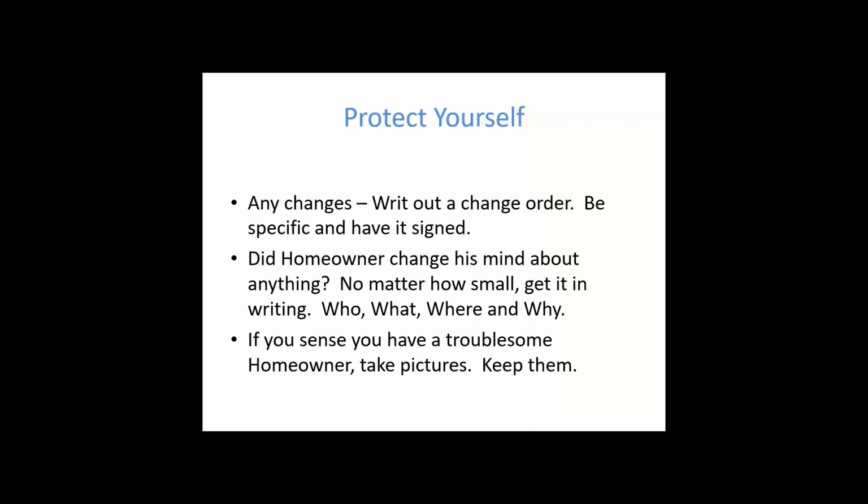It was originally one time discussed in a contract that the installer would install the decking. What wasn't addressed was who was going to get the decking to the home site. That's a basic that should have been addressed. And so there was a fight between the homeowner and the installer as to who was actually going to bring the decking to the home site. And you don't want to have those basics left out. So no matter how small, think of all the details involved.